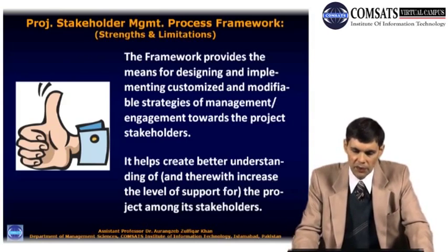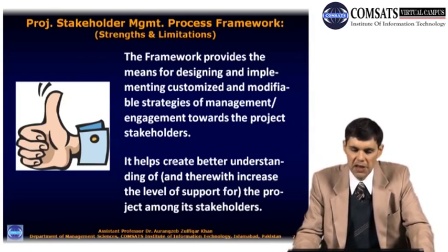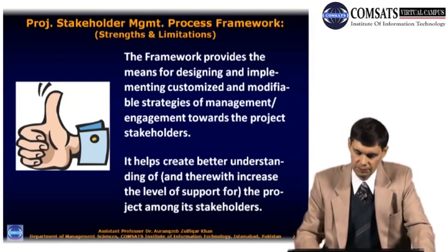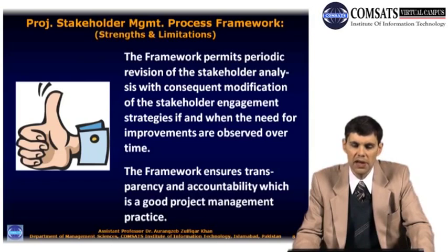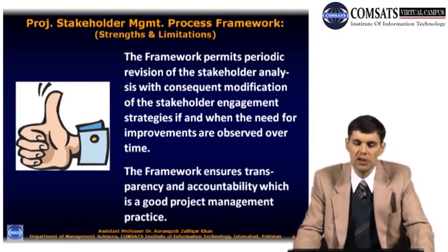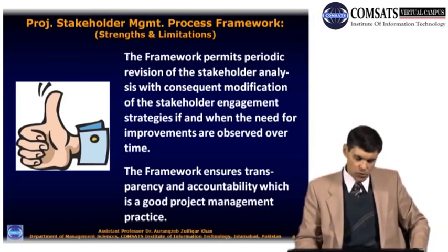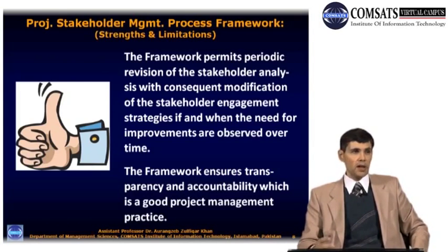This framework brings great benefits for those who are managing and engaging project stakeholders. It also brings benefits for the secondary or external stakeholders. The framework permits periodic revision of the stakeholder analysis, with consequent modification of the stakeholder engagement strategies if and when the need for improvements is observed over time. This comes back to what I said, that stakeholders are dynamic. Their interests may change, their attitudes may change, their behaviors may change, their exercise of options may change. That is why you have to periodically review your stakeholders.